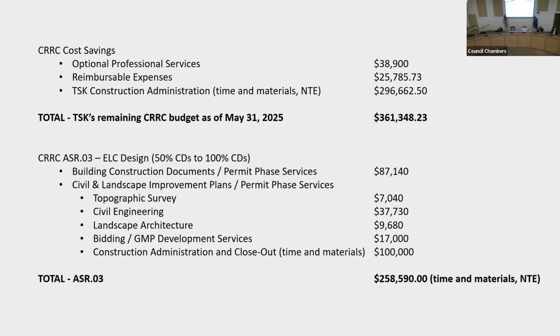So, for instance, April and May, they billed us for almost $34,000. Okay, so there's still June and July left. They've got $361,000 left and something left in their budget not to exceed. So we're probably not going to spend all that in June and July. Maybe $30,000, maybe $60,000. Just a guess. Do we get even like a general estimate of how much our bill's gonna be for the month? Well, we can base it on what we've seen in the past, and that's kind of why I'm saying that, is that I'm basing it on that.